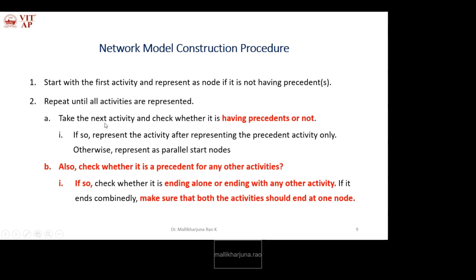For the next activity, we also have to check whether it is a precedent for any other activities. If so, check whether it is ending alone or ending with any other activity. If it ends combinedly, make sure that both activities end at one node.